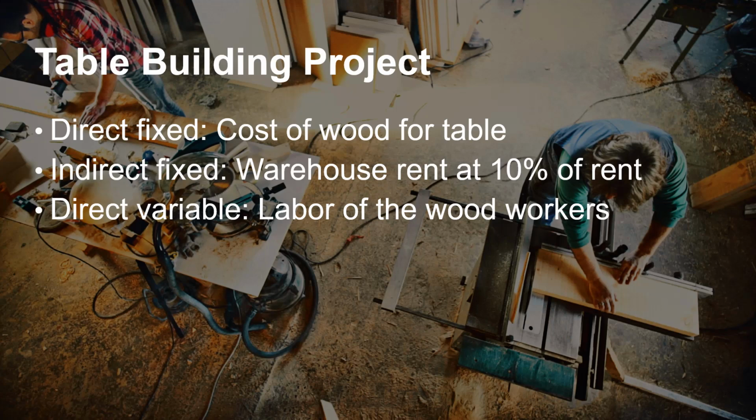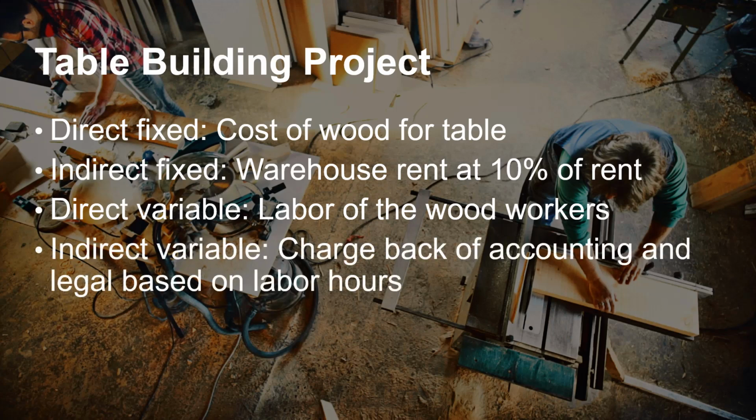However, there are accounting and legal staff that help the company run, and your project has to carry the burden for some of these costs. The company decided to charge a certain amount of these people's time to your project based on the number of hours you bill. The concept is that the more hours your people report, the more work the accounting group has to do.